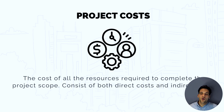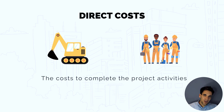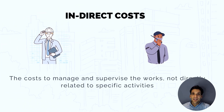Let's define some core concepts. First: project costs. Project costs are the costs of all resources required to complete the project scope — anything we have to spend to acquire the resources necessary to complete the project. These costs fall into two main categories: direct costs and indirect costs. Direct costs are costs directly applicable to completing portions of the project scope. For example, if we're building a bridge, the cost of the concrete foundation — excavating holes, pouring concrete, fixing steel — all fall under direct costs.